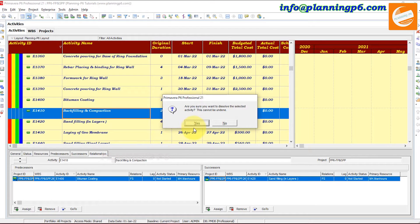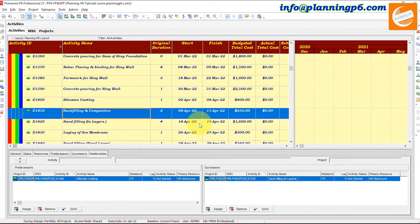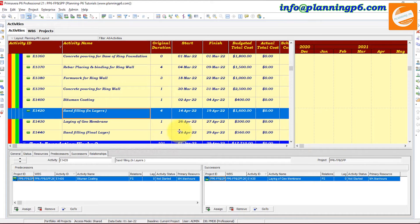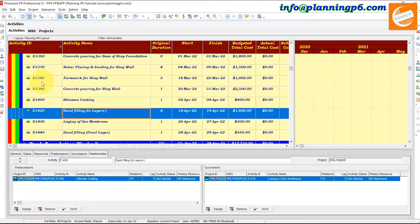To keep the relationships intact when deleting an activity, use the Dissolve option instead of Delete. Dissolving the activity will automatically connect the previous activity as the predecessor and the next activity as the successor. Note: this action cannot be undone once committed. After dissolving, you can see the predecessor and successor are already automatically assigned by the software.